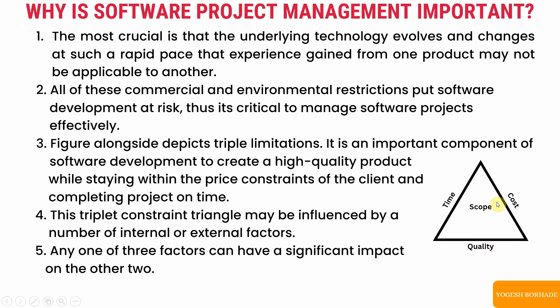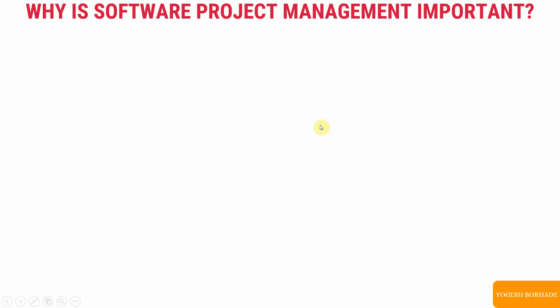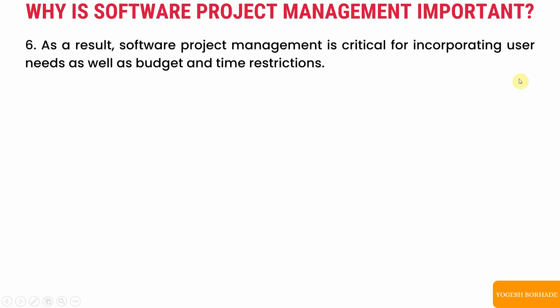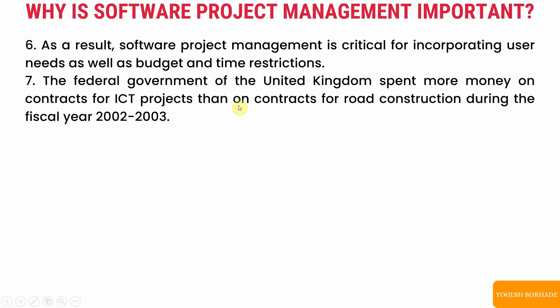As a result, software project management is critical for incorporating user needs as well as budget and time restrictions. It is difficult to maintain product quality within budget while also meeting user needs. For example, the federal government of the United Kingdom spent more money on contracts for ICT projects than on road construction during the fiscal year 2002 to 2003.